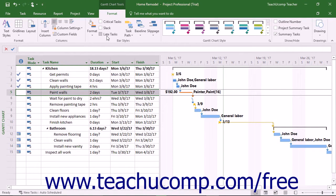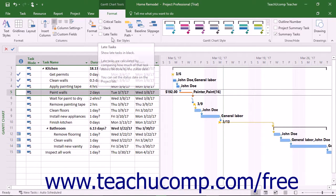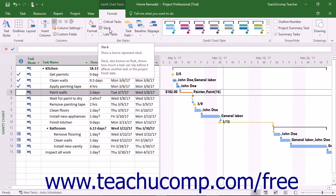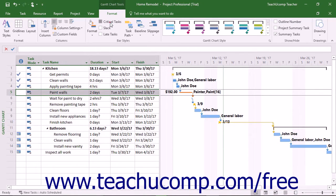The next few check boxes in the Bar Styles button group on the Format tab of the Gantt Chart Tools contextual tab let you apply special formatting to the types of task bars shown. You can check the Critical Tasks check box to show critical tasks in red. A task is a critical task if it must be completed on time for the project to finish on schedule.